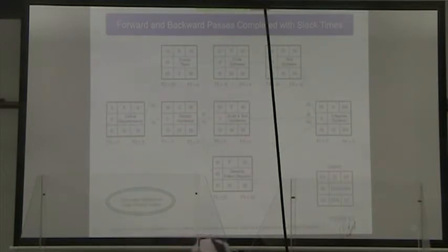That is the path we have to manage very carefully to make sure that it stays on time, or the project will be delayed if any activity on it goes into overtime. So for doing it this way, there will always be a critical path that has to be identified.